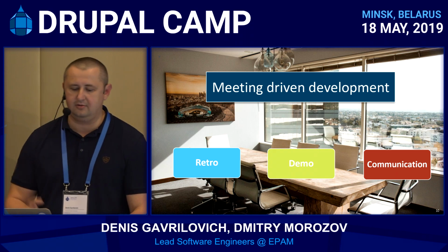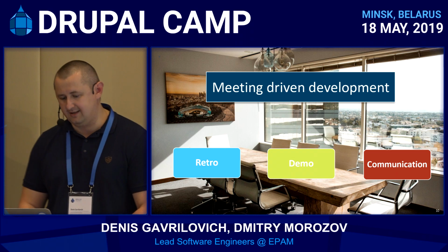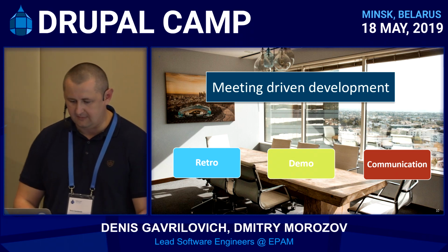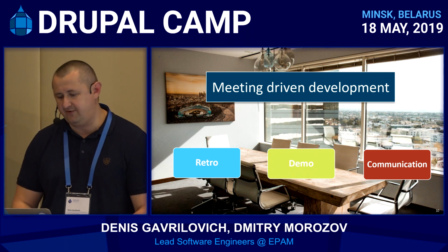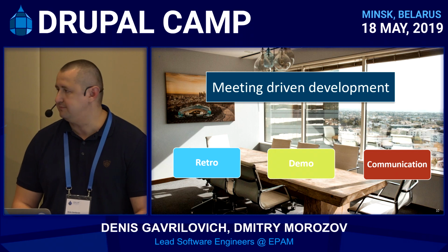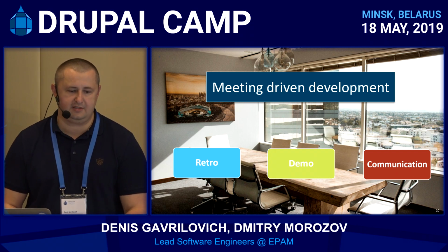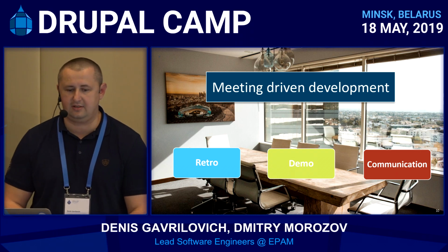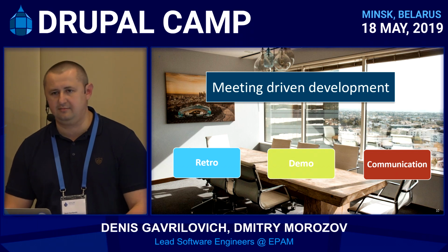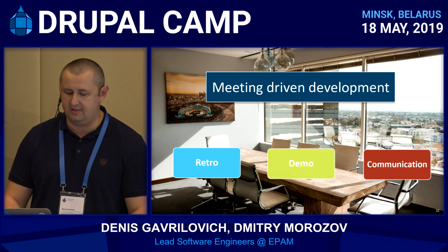We also have an annual retro session for every team, an annual retro session between teams, and also a final retro session with customers, and so on. And despite the fact that, in my opinion, it's probably the most important meeting in IT development, sometimes it's not efficient. My suggestion here: always start your retro session with items in progress and in the done column, because retro is not about raising problems, retro is about fixing problems.